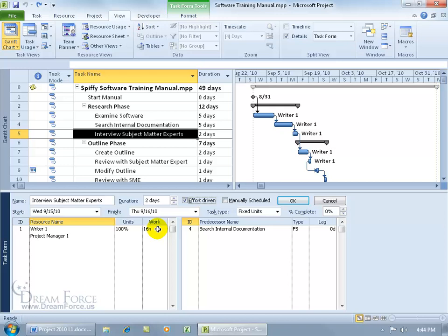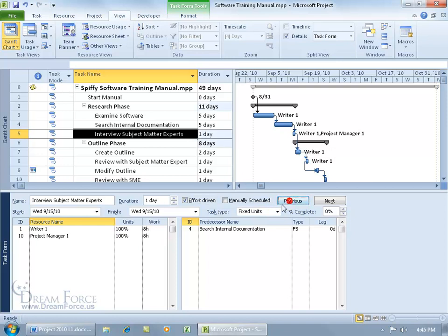So instead of 16 hours for one resource you'll still have 16 hours but it will be 8 hours each. So if I click OK, there you go, 8 hours for Writer 1, 8 hours for project manager, and because they're both working on it at the same time, instead of two days you get your 16 hours done in one day.